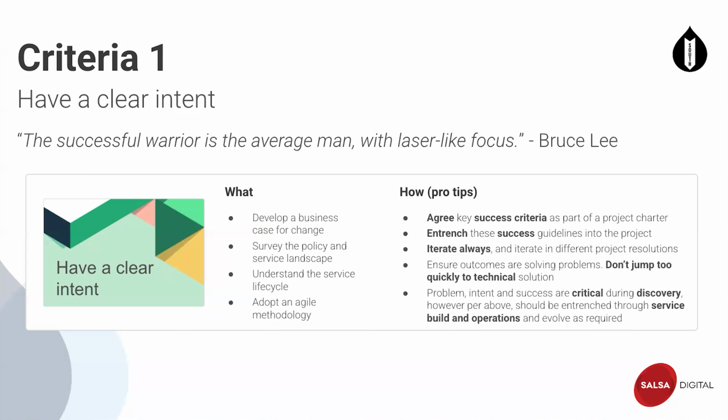Things that I've seen work well, and feel free to stop me here now or later. We could drill in. I can explain where I've seen these and provide examples if you want. But just really, really important to agree success criteria. Entrench the success criteria in the project. Don't just have them as discovery deliverables, but refer to these as principles and criteria ongoing.